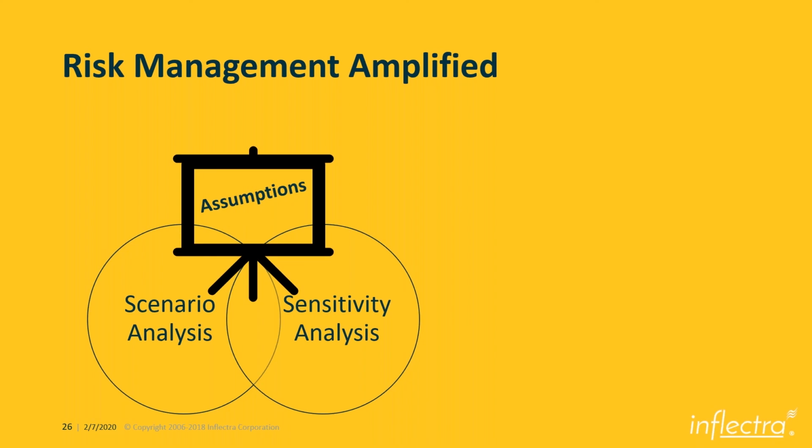You are looking at assumptions and validating them, and what if they are not going to be true? Then risk is going to come into play, right? On the scenario analysis, you are using a lot more discrete probability, like low, medium, high. Low means 25% and lower. High means anything over 75% and lower than 90%.